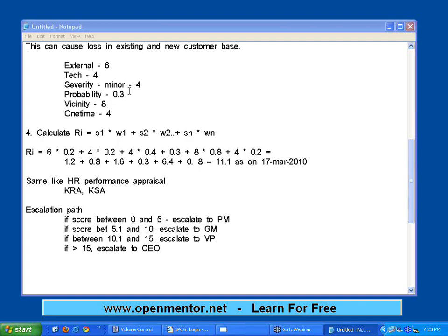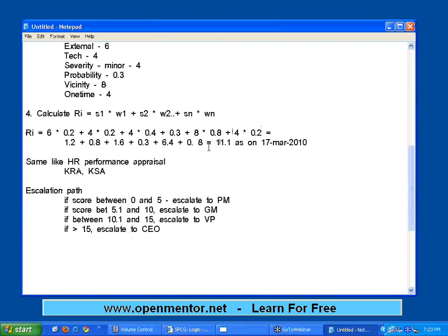Depending upon that, they will give a port level warning, city level warning, district level warning, or state level warning, so that at the escalation path, people at that level must be aware. The higher the score, the higher the authority who will be addressing that particular risk. This is how every single risk in every single project must be assigned a number. Finally, management wants a number.